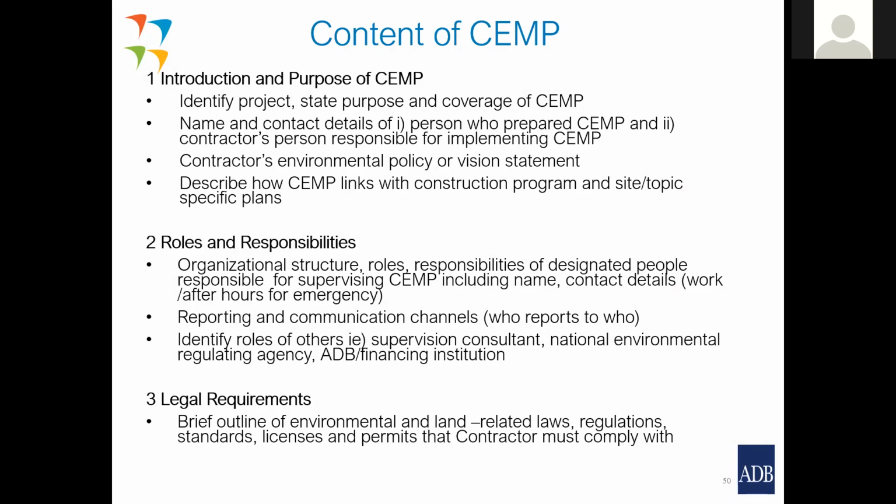In the introduction, we want to see how he describes how the CEMP links with the construction program and all the various site-specific plans or topic-specific plans. This is in the introduction. The purpose of the CEMP, how it all holds together, what the structure of the CEMP is. Section 2, roles and responsibility, very important. What is his organizational structure? Roles and responsibility of designated people on the contractor's team.